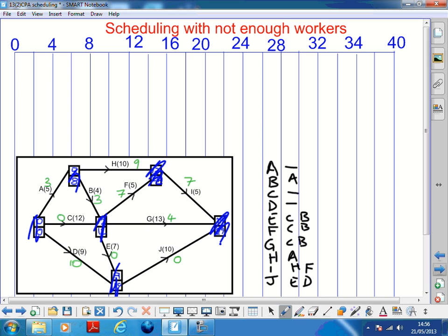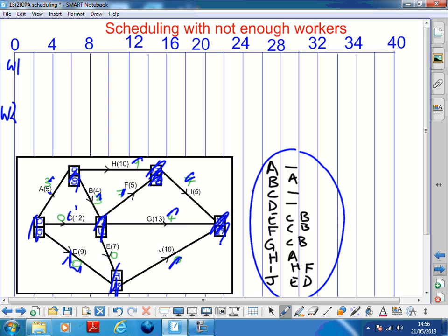So they're just jobs now that need doing as quickly as possible. The precedences still hold, but there's no float, there's no early and late times, because they all help you finish in 29 days and we can't finish in 29 days because that leaves 3 workers and we've only got 2. So now you're still scheduling worker 1, worker 2, keeping an eye on your precedences, which I've written a precedence table here, which you can also see from the network, but table or network doesn't matter. The point is now all of those numbers that we've been focusing on are irrelevant.